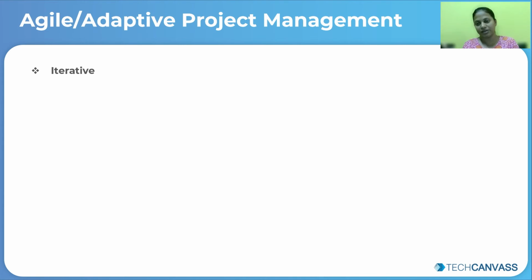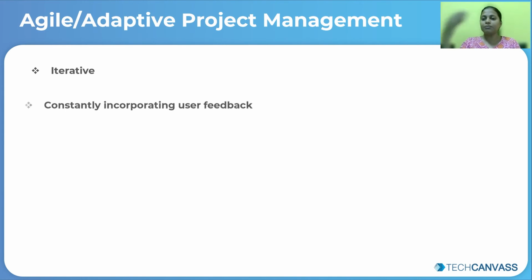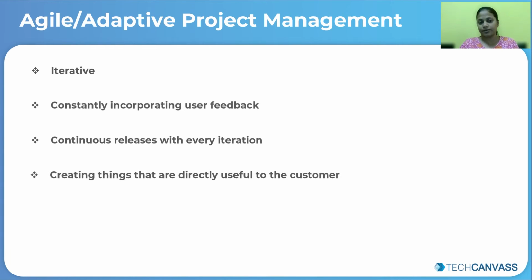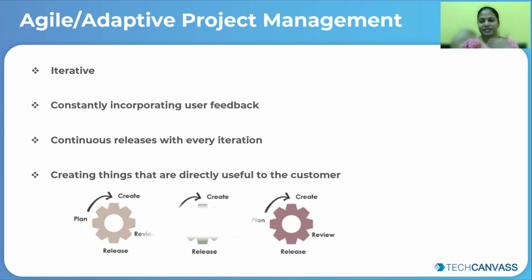When I say we get it to production, that means the project is live and people can start using the product which we have developed after every iteration, and they can always get back to us with feedback. Adaptive project management is more about inspecting and adapting with respect to changes, and it happens very early. So even if you fail, the work which gets hampered is just 2 weeks. You can always come back and rework on it in the upcoming sprints. So it's iterative.